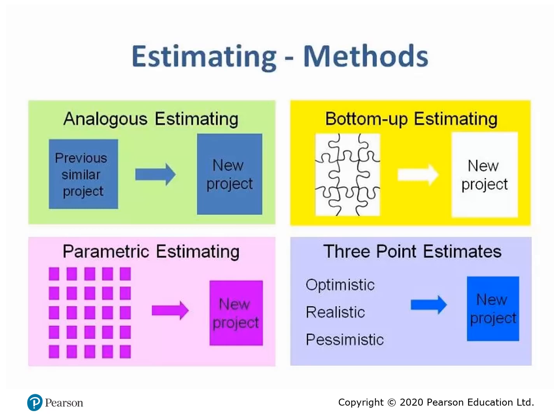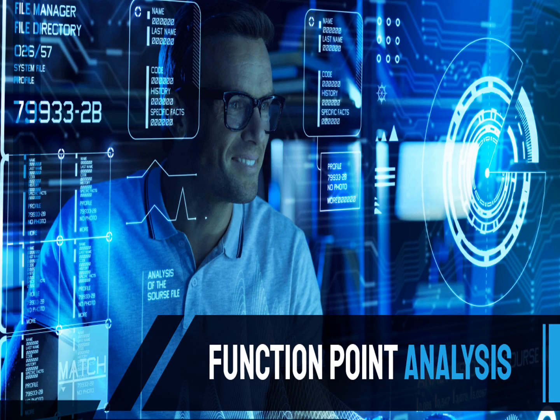This diagram explains in detail that analogies estimating compares with a previous similar project, bottom-up estimation is based on work packages, parametric estimation compares with a similar project, and three-point estimation is based on optimistic, pessimistic, and realistic — meaning most likely — estimates.